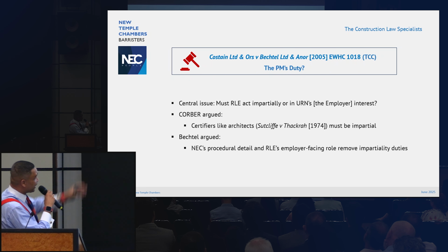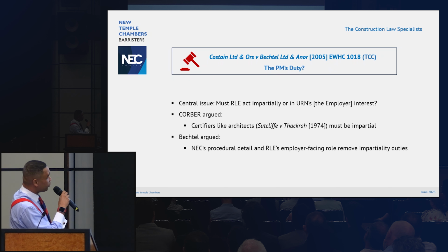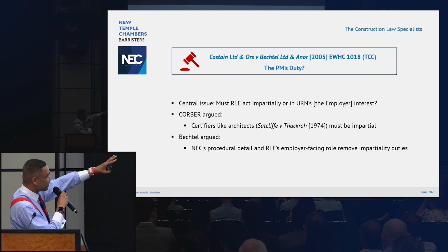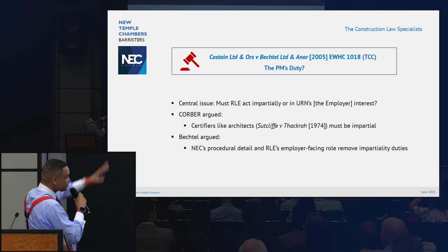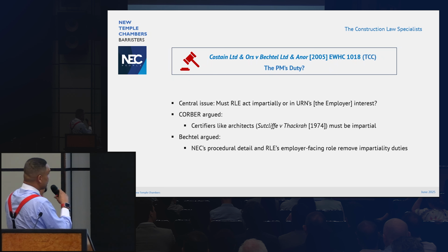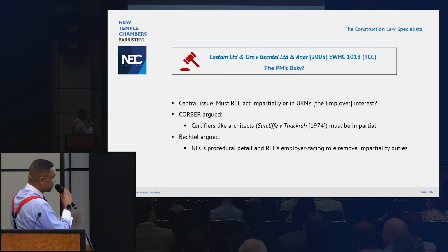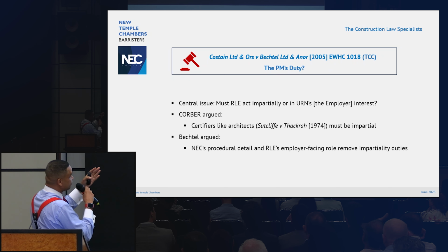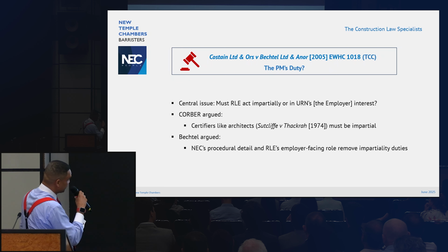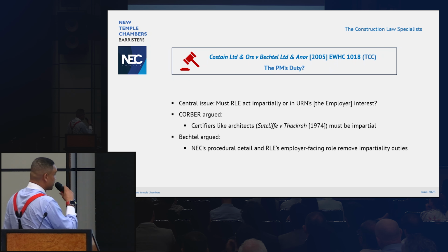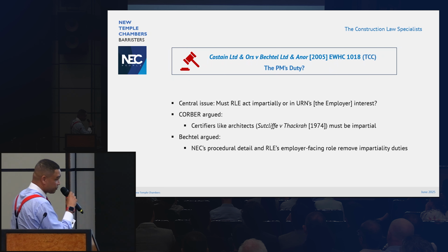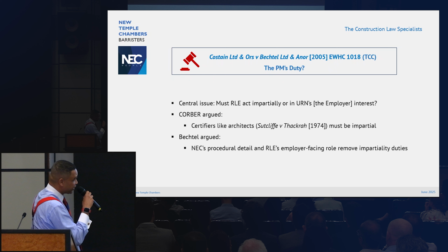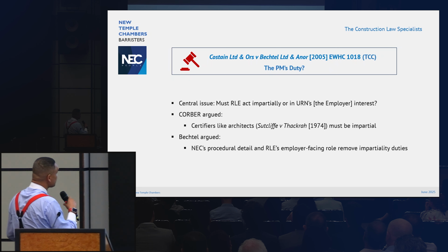Key point: did they have a duty to act impartially, or at that time, in that particular contract, as opposed to NEC4, it wasn't the client, it's the employer's interests. It was argued certifiers, going back to Sutcliffe back in 1974, must be impartial. That was what was argued. Bechtel argued otherwise. Procedural detail: employer-facing role removes impartiality duties.